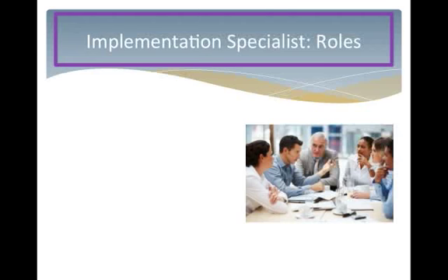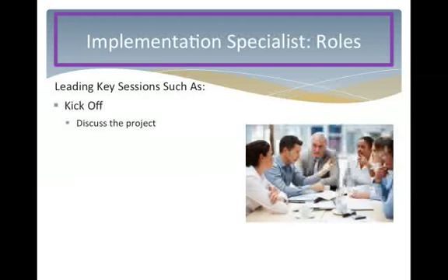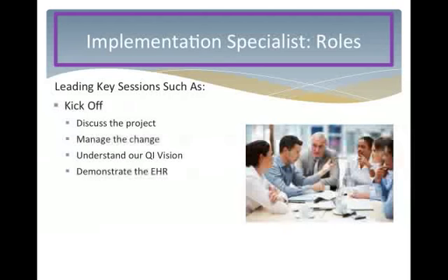Once our team has been formed, we have a kickoff meeting to discuss the project in general, as I know this is new information for everyone. We talk about how to manage this big change at the health center, revisit our vision for quality improvement and how the EHR will help us meet it, and demonstrate the features of the EHR, as many team members may not have seen it before.